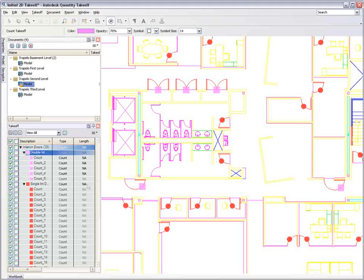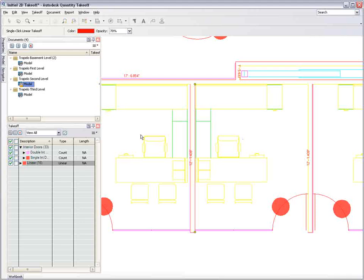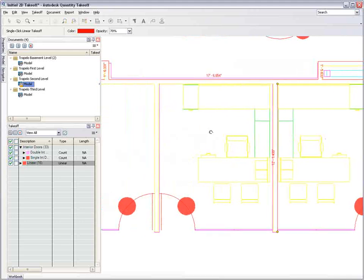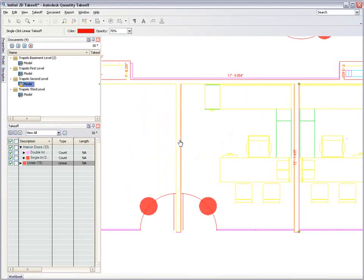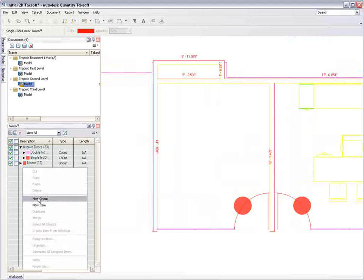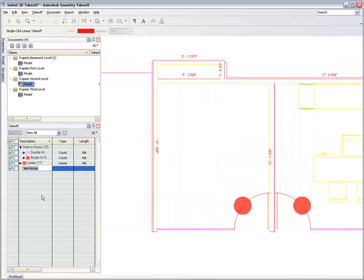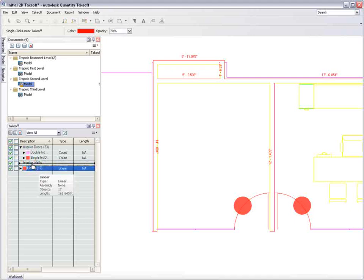When quantifying walls, for example, tools are available for you to perform linear takeoffs with a single click. Autodesk Quantity Takeoff can recognize individual lines that represent walls and provide an accurate length. The takeoff group can then be renamed to identify the object type and if required, additional properties can be assigned including details of the object's construction.